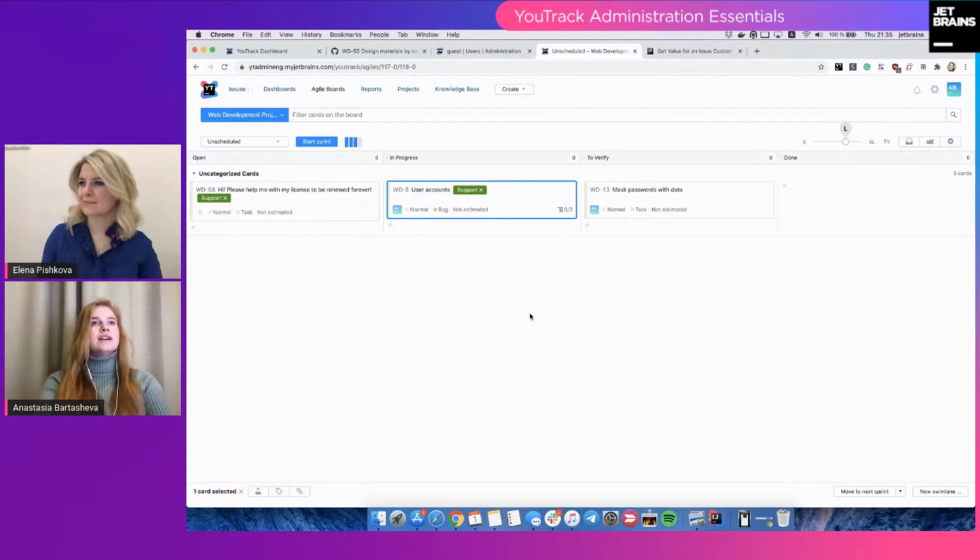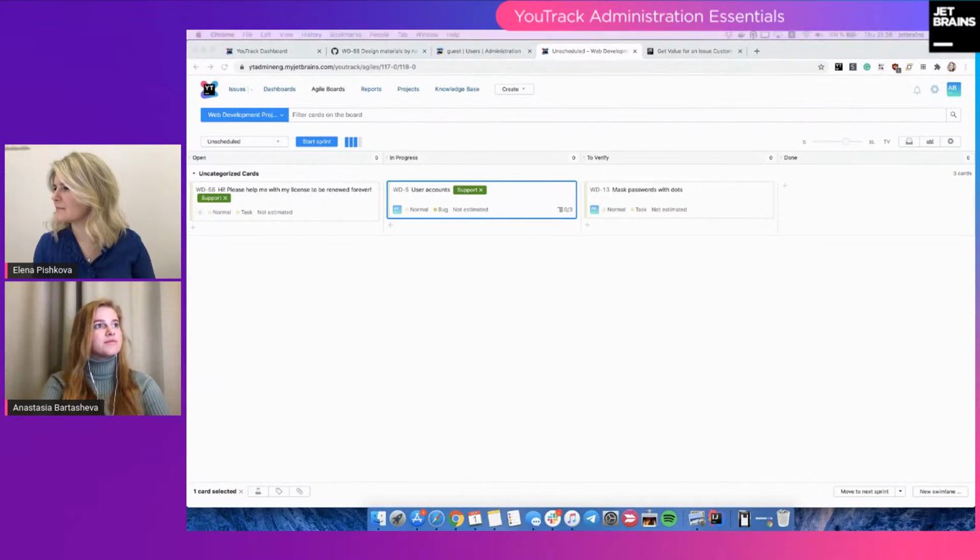And yeah, we have state machine workflows. They are supplied by default, and this state machine workflow is able to raise the priority of a task if it's not taken care of in 7 or 5 days. So I mean, the issue is in progress for 5 days and nothing changes there. So the priority rises to critical or major, and you see that something goes wrong. So yeah, multiple ways to achieve that. So you just need to choose the one that suits you the best. And if you have any questions, please contact us. We'll help you with the implementation.